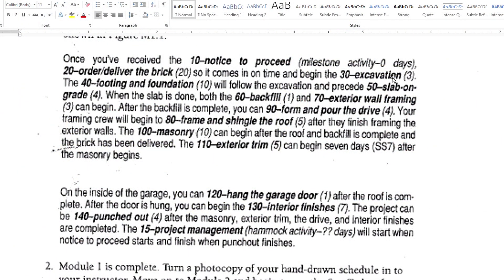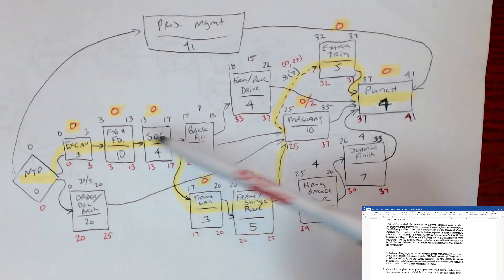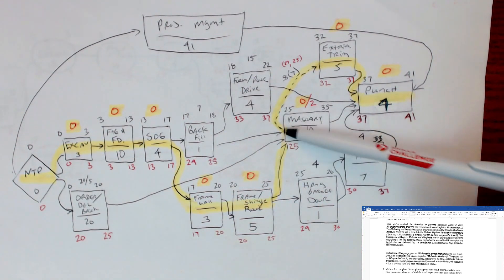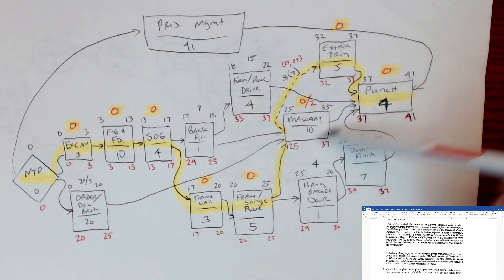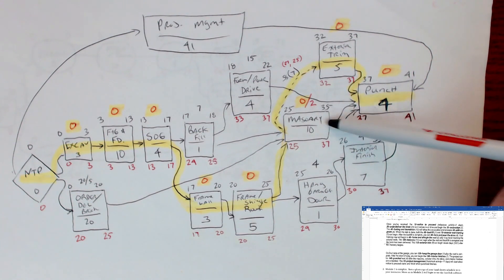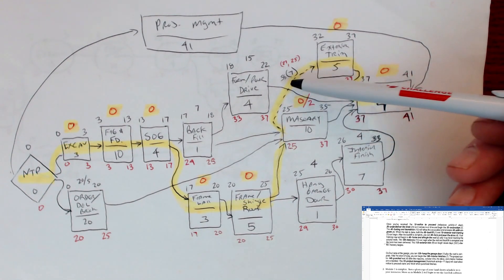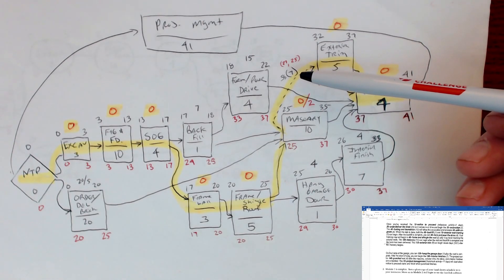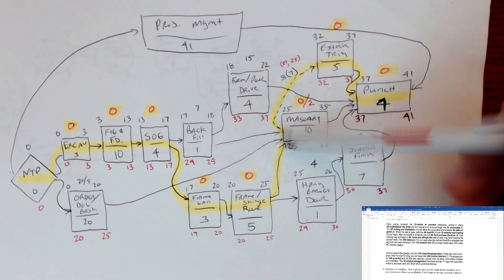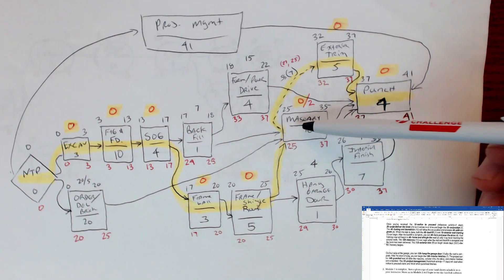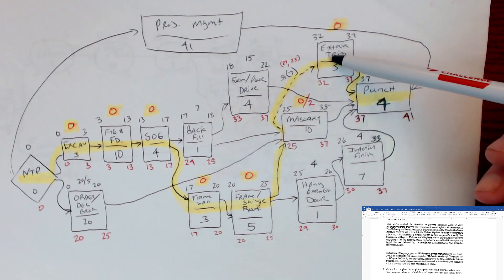So now we've got three activities going to masonry. The last sentence says the exterior trim can begin seven days after the masonry begins — that is a start-to-start relationship. All the other ones are finish to start, finish to start, finish to start. This one is start to start. When you're looking at one of these nodes, the front of it is the start and the back of it is the finish. We're going to use a dashed line to show that, with a seven-day lag.